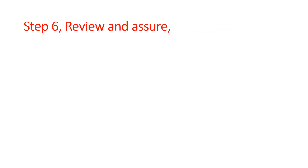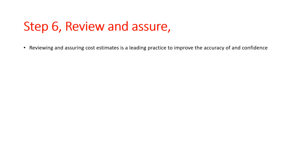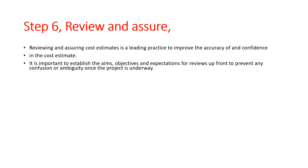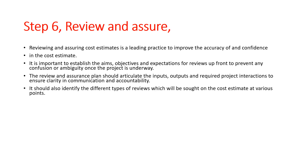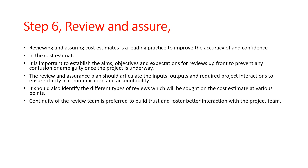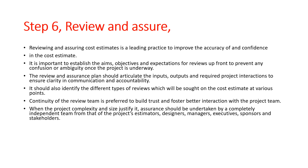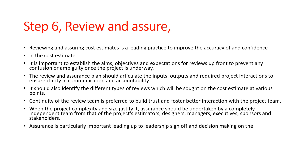Step 6: Review and Assure. Reviewing and assuring cost estimates is a leading practice to improve the accuracy of and confidence in the cost estimate. It is important to establish the aims, objectives, and expectations for reviews up front to prevent any confusion or ambiguity once the project is underway. The review and assurance plan should articulate the inputs, outputs, and required project interactions to ensure clarity in communication and accountability. It should also identify the different types of reviews which will be sought on the cost estimate at various points. Continuity of the review team is preferred to build trust and foster better interaction with the project team. When the project complexity and size justify it, assurance should be undertaken by a completely independent team from that of the project's estimators, designers, managers, executives, sponsors, and stakeholders. Assurance is particularly important leading up to leadership sign-off and decision-making on the cost estimate at key stage gates.